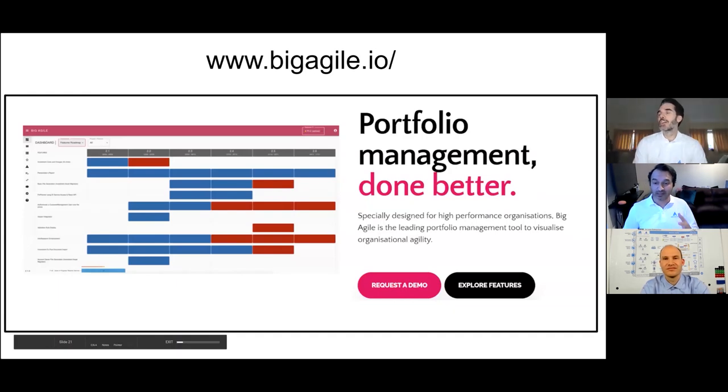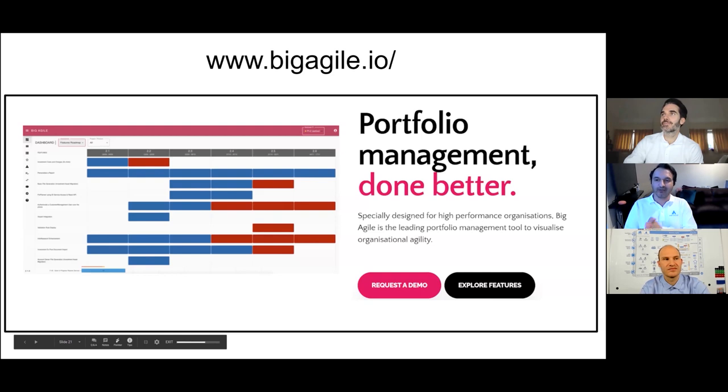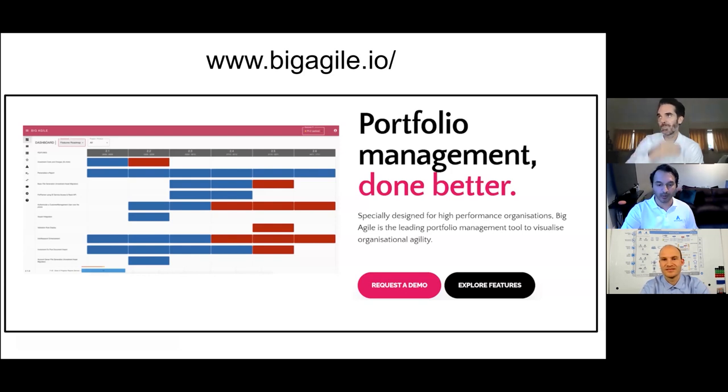As we spoke at the beginning, it connects to Jira using APIs. For a given feature, it would look at the epic in Jira and look at all of those stories. The stories inside Jira can be in a number of states — either not started, in progress, or done. It looks at those stories and says, out of all the stories inside that feature, how many are done? Then it works out the percentage from that. So it's actually a live view from all of the Jira instances you've connected.